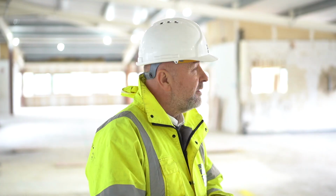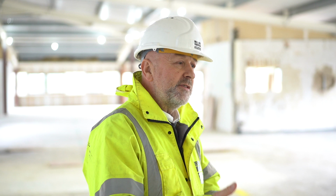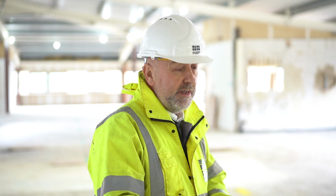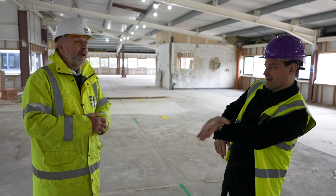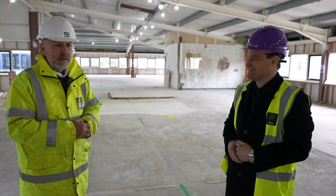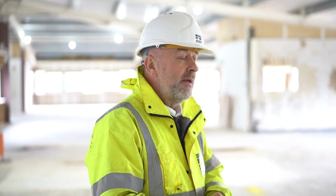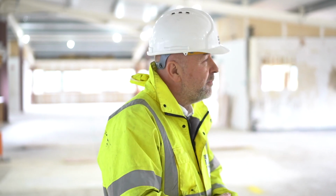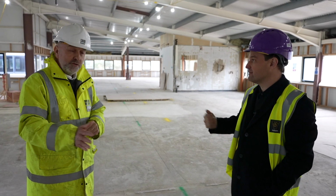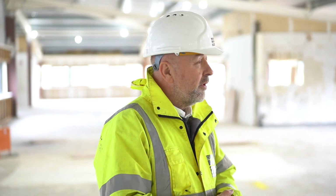Where we have gone to sites and there have been some problems, the job's late, it's over budget, it's not to the quality or standard, the first thing we ask for is, can we have a look at the contract? And some of the most articulate and capable people, who in normal life are considered professionals in their own walk of life, suddenly will present me with something, as you quite rightly said, no better than the back of a fag packet. But invariably, it's the terms and conditions which the builder has placed, and it's under his terms. They've happily signed it, and one can drive a coach and horses through it, because of course the onus is to protect the builder, and it leaves the employer exposed.